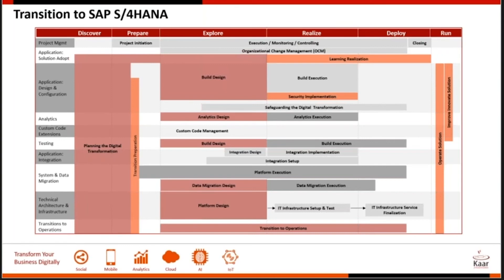When building your development and QA systems, it is recommended to freeze all development, remove open developments to review later, and overwrite the development system with copies of production. This helps in two ways: once you've gone live, your development and QA systems are very close to production, making support easier. Also, each mock run is performed on a copy of production, so when you do the final production run, the only difference is the transaction data that changed in between — avoiding unknown errors in the last phase.